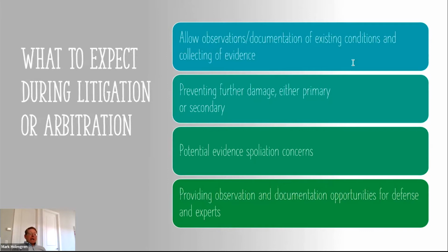But the developer is not obligated to do anything. So he has the right to repair, but he's not obligated to repair. Then the next step would be to negotiate with the developer for anything that he won't fix out of hand. And then your next step after that, if you can't resolve it through negotiations, you go to mediation.